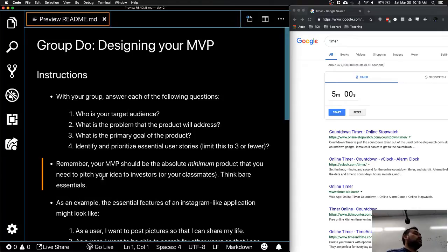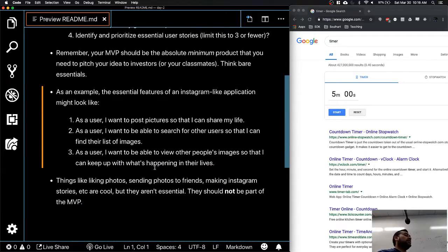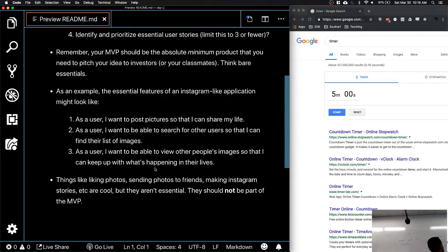Okay. So the second part is creating the task. Now, how do you create a task, let's suppose, on the Instagram website? You'll follow the same strategy. The template that we usually follow is that you start your task saying, as a user, right? As a user, what do I want to do? So as a user, I want to upload a picture.